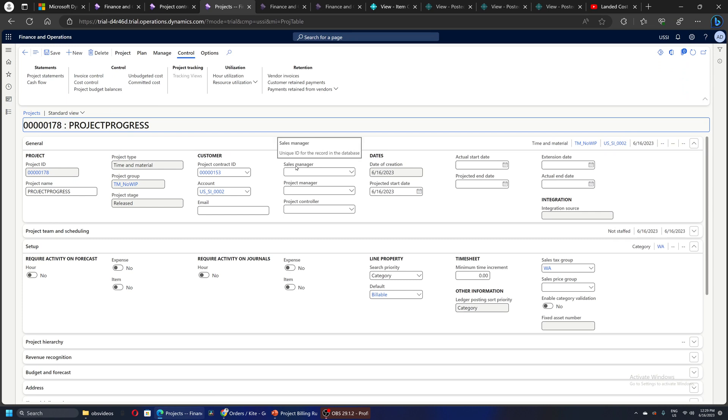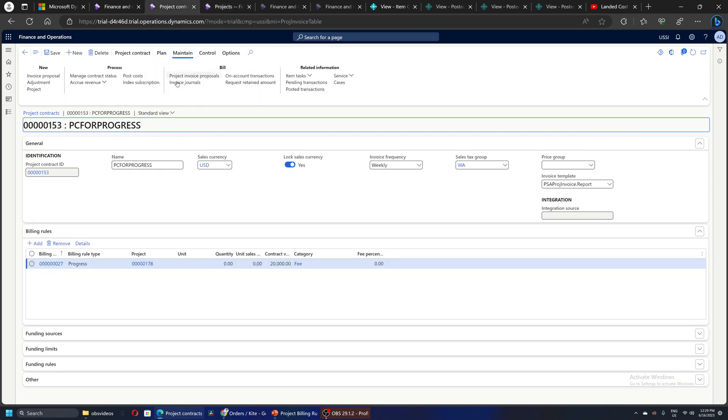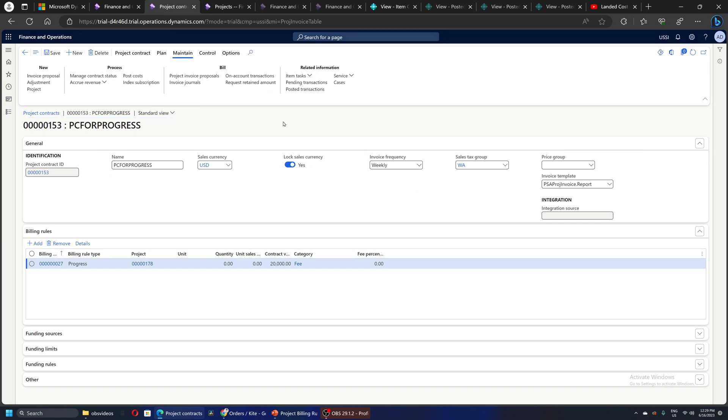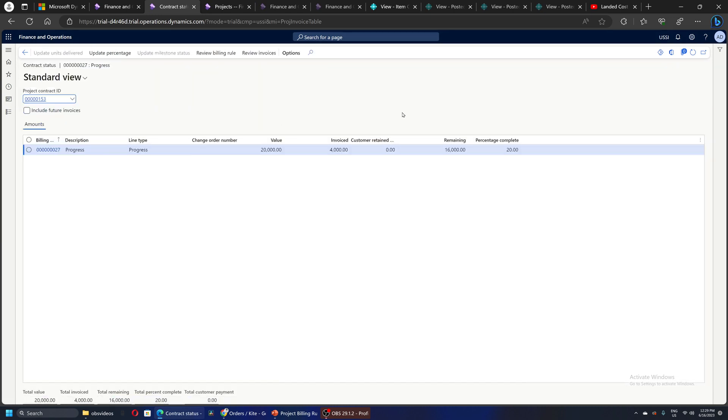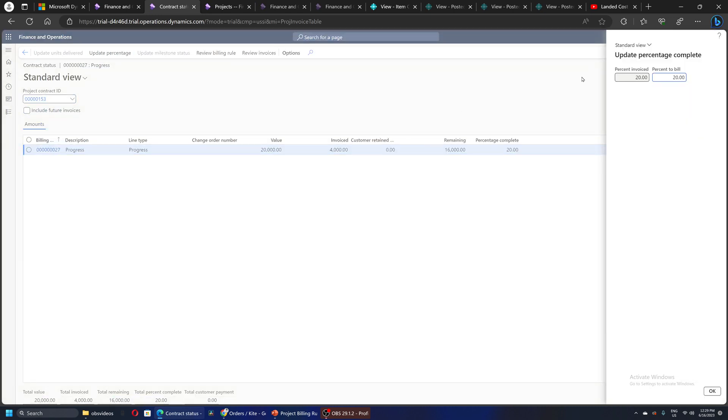Further on, more work is completed. Again, we go back to the project contract and manually update the status. Let's say it's showing me that 20 percent has already been invoiced, and let's say now 30 percent of the work is done. So basically the project is probably still 50 percent, so I'm going to bill for the next 30 percent of completed work. So the same process is repeated; nothing is special about it, it's very simple and straightforward.